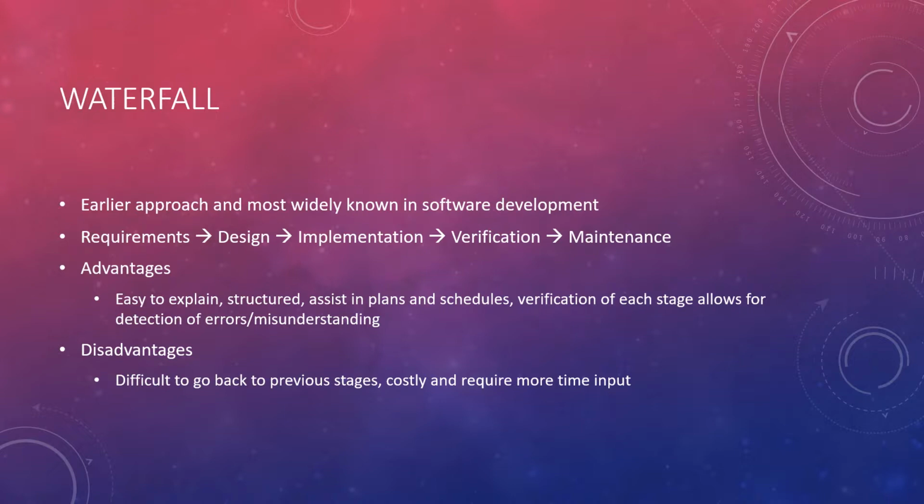And so I've listed here the advantages and disadvantages of the waterfall model. We can see that the advantages may include it's easy to understand because it's just step by step. It's very structured, so it's very organized. It assists in planning and scheduling. One step has to be approved before it actually moves on to the next step. However, there are disadvantages, including the difficulty of not being able to go back to the previous stage because it's a waterfall model, so you can't go back to requirements after you've already achieved designing. And it can be costly and requires more time input.